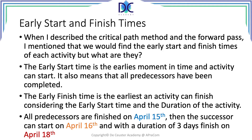Let's look at a simple calculation. Let's say for the activity all predecessors are finished on April 15th — in the evening we stop work — so the successor can start earliest on April 16th. With a duration of three days it will finish on April 18th. Note that 16 plus 3 equals 19, but counting the days: April 16th is day one, April 17th is day two, April 18th is day three. So the formula is: early finish = early start + duration − 1, i.e., 16 + 3 − 1 = 18.